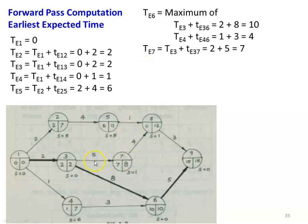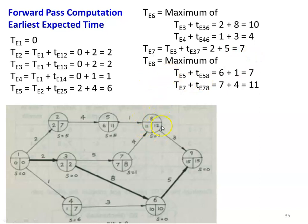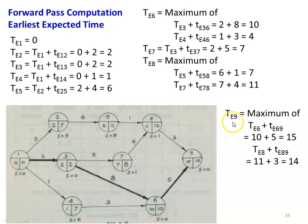TE7: there is only one incoming arrow, so TE7 equals TE3 plus t(3,7) equals 2 plus 5 equals 7. TE8: there are two incoming arrows, so we take the maximum of (TE5 plus t(5,8) equals 6 plus 1 equals 7) and (TE7 plus t(7,8) equals 7 plus 4 equals 11). The maximum time equals 11. TE9: again maximum of two incoming arrows — (TE6 plus t(6,9) equals 10 plus 5 equals 15) and (TE8 plus t(8,9) equals 11 plus 3 equals 14). The maximum value is 15. All earliest expected time TE values for all events are now calculated.